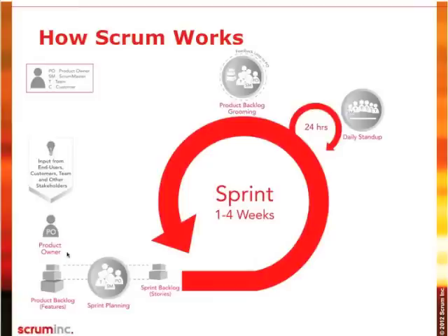At some point over the course of the sprint, the team needs to engage in product backlog grooming. This is essentially looking ahead at the product backlog and those stories that were defined less precisely further down the backlog, and making sure that the learnings of the past sprint have been incorporated. The definitions of those features are becoming more and more precise as they rise towards the top of the backlog, to ensure that they are ready when it comes time to bring them into the sprint.